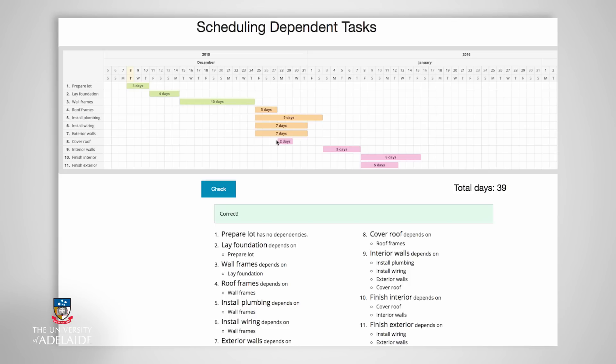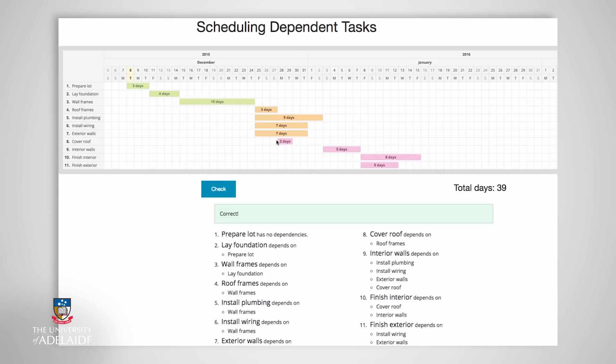Covering the roof can be done soon after the roof frames are erected, but it does not need the plumbing or wiring to be in place before it can be completed. The interior walls and external finishes have their individual time frames that are dependent on other activities being completed. Looking at the schedule, you can see that the total days are now reduced to the required 39 by completing some activities simultaneously. By reducing the amount of time to complete the project in 39 days, we have been able to fast-track the schedule.